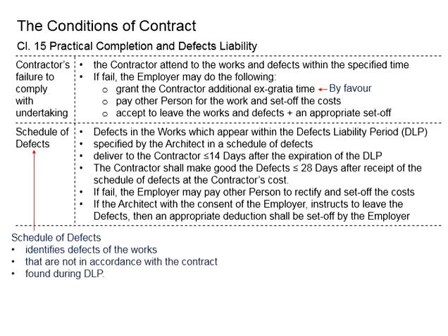Then the contractor can make good use of this additional time to finish up the rectification works. Or the employer has the right to pay for another person to do the work. The cost will be on the contractor. The employer can offset the relevant costs from the payments to the contractor.